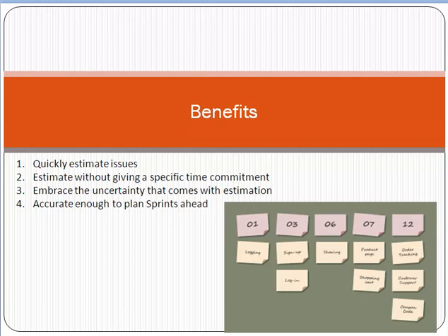So in story points there is no concept of hours. Actually, there is a concept of difficulty level and complexity level. Story point is basically an estimation technique based on the complexity and difficulty level of the functional requirement of users. Based on that, we assign numbers, points, to the story so that we can understand how much effort is required to accomplish or fulfill that user requirement.